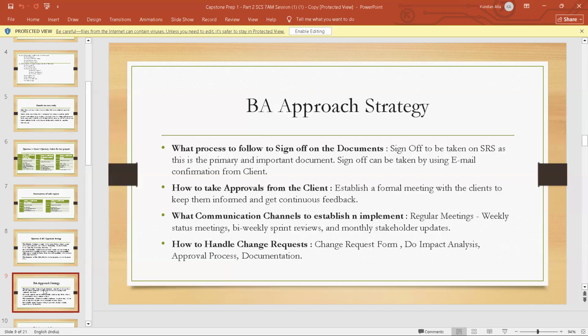Okay. So after that, we need to get a sign off from the client on whether the requirements that you have written in the document are good or not. If good, then he will put some sign and we can move forward. But if not, then he will be adding some requirements, some extra add-ons on that document, and then he will give the sign off.